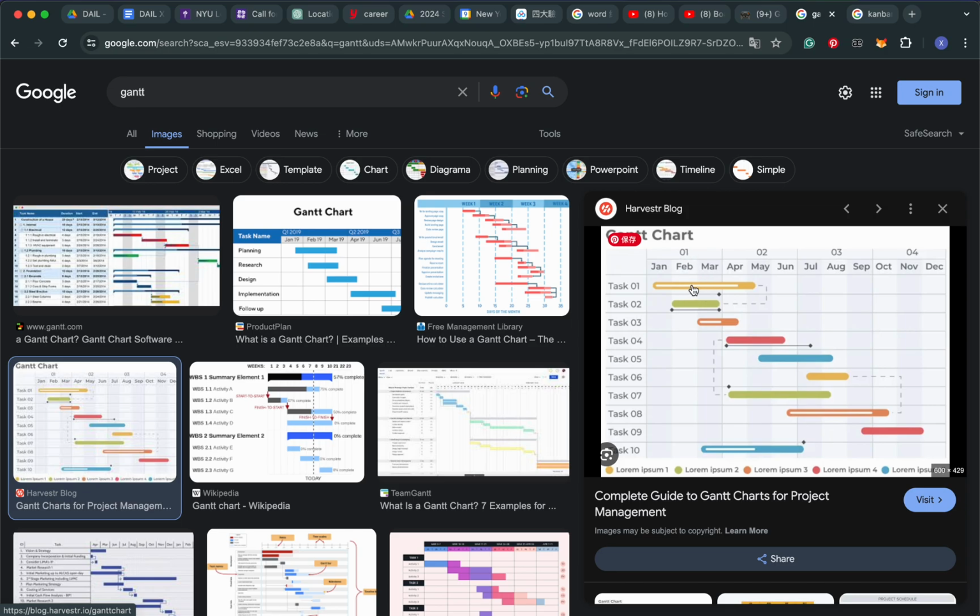Like you can assign the column with a day or week or even hours, and then create a rectangle representing the tasks and define the duration of the tasks, or change the width of the rectangle representing the duration, and even you can connect the tasks together from the ending of one task to the beginning of another task to create the dependence.